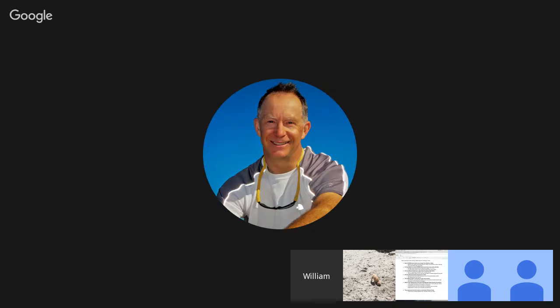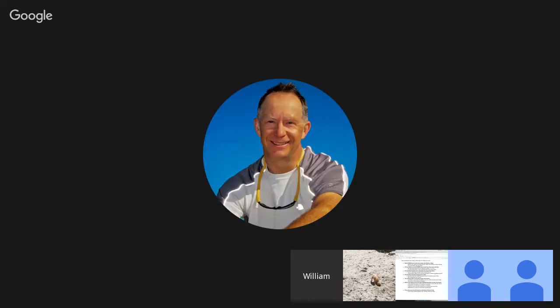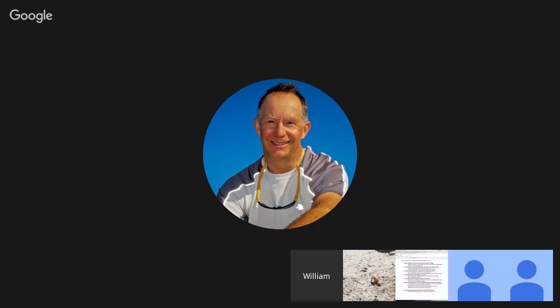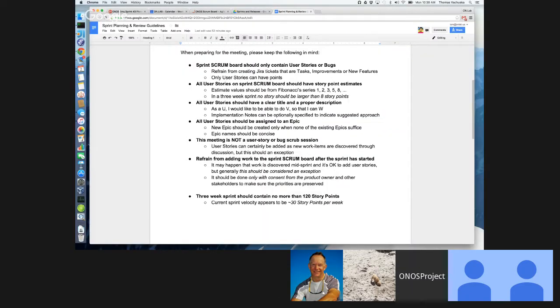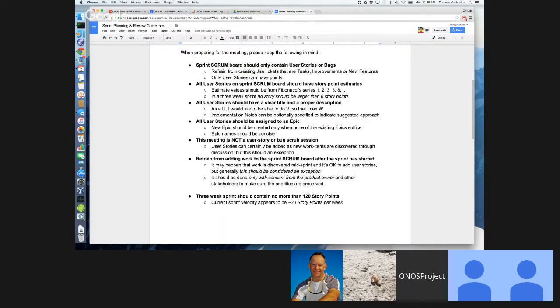And finally, last but not least, we should make sure that we don't overload the sprint. We've done this in the past, and if you analyze the sprint velocity of the team as it stands right now, we've been achieving roughly 30 story points per week, which means we should really not have any more than 90 points. But allowing for a little bit of an overload of the sprint, we should really have no more than 120 story points.